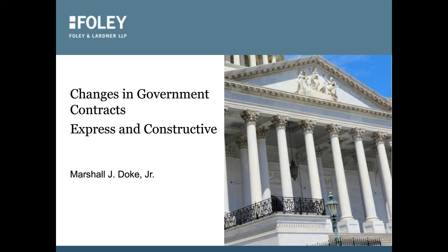The classic example, some of you may not remember this, is the famous man who put out the fires of the oil field, Red Adair. His contract had three words of specification: put it out. That's a performance specification. The government, and this is something that some people don't understand, and it's sad because it's a very important point, guarantees or warrants that the specification and the drawings they give you are accurate. In other words, contractors are entitled to rely on the government's contract documents. The government guarantees that if the contractor follows the specifications and drawings, a satisfactory product will result.